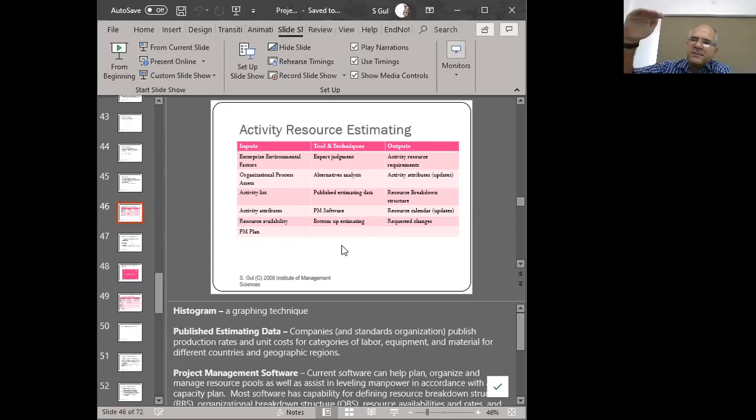Right? Top-down estimation means that you don't go through the process of decomposing and coming slowly down to the small level to estimate. Rather, you make your estimate at the topmost level. So, for example, as an expert, I can perhaps inform you that it takes 10 days to develop the engine of a car, right? So that's a very top-level estimation. I haven't gone through the motion of decomposing the engine into its components, the engine block, the assembly, and so forth, and then saying how long each piece takes and adding it up together. Rather, I said, well, the engine as a whole takes this much, right?